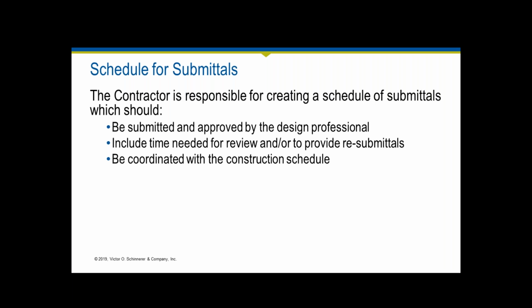For you to protect your profit, you need to be able to say, okay, this is the level of effort that is required, and this is when I expect these submittals to come, so that you can properly plan, to the extent possible, your resources and make sure that this is indeed a profitable offering that you provide to the owner, and it makes sense for all involved.